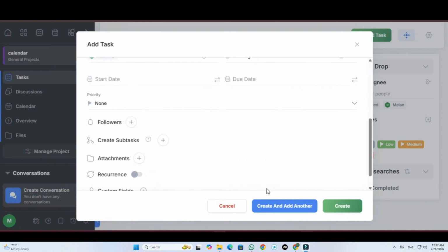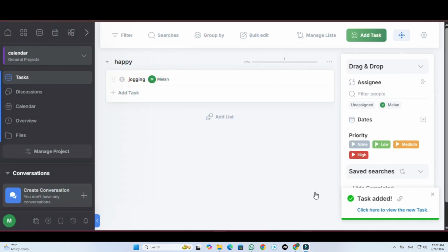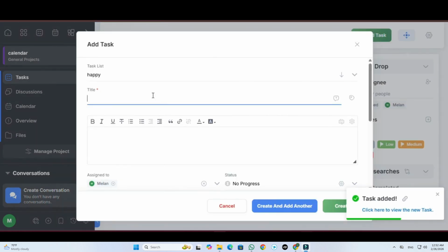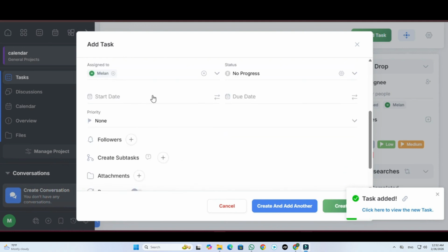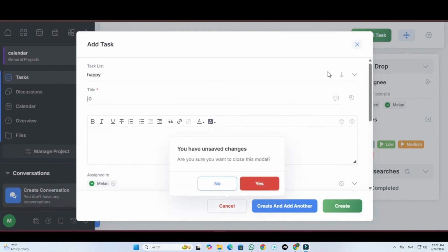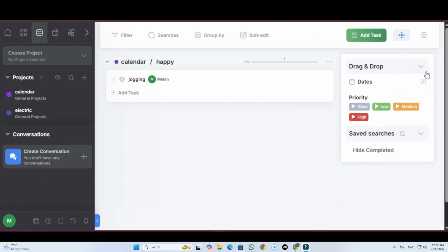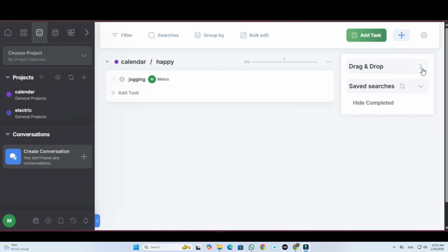This tool helps you stay organized, meet deadlines, and allocate resources effectively across your projects, tracking progress with Gantt charts. Freedcamp includes Gantt chart functionality to help you visualize your project timeline. By accessing the Gantt tab, you can see how all your tasks and milestones align over time. You can adjust task durations by dragging the edges of the bars and create dependencies by linking tasks together. This makes it easier to plan projects, anticipate challenges, and identify potential bottlenecks before they disrupt progress.